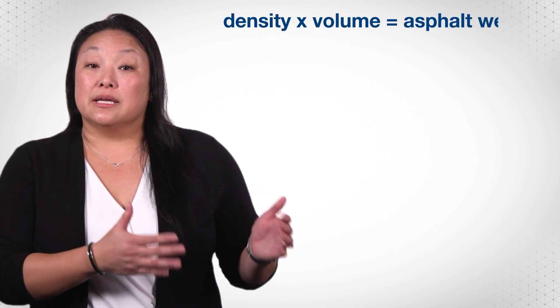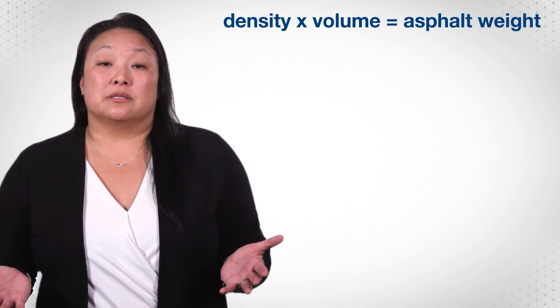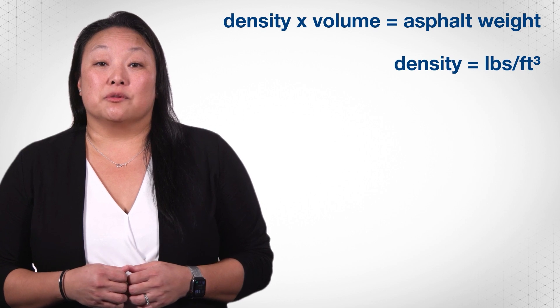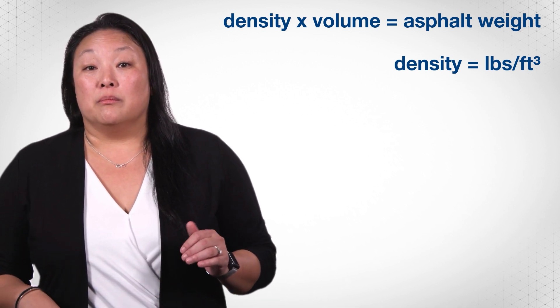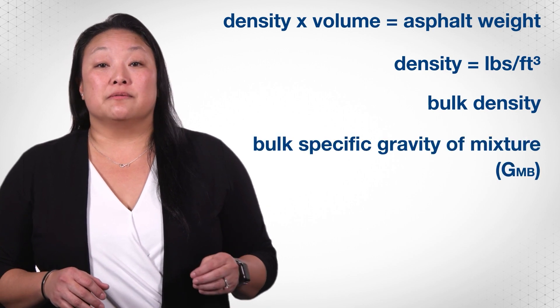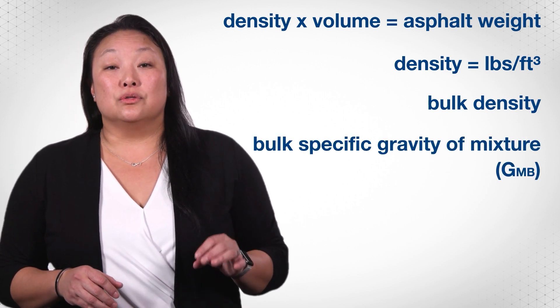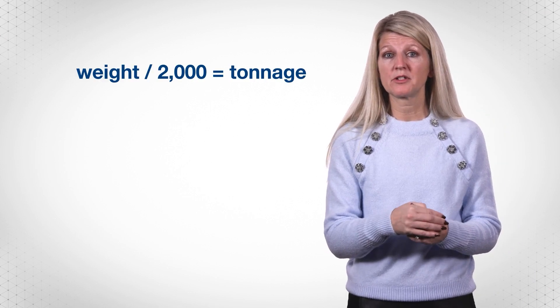Next, use the density provided by the supplier as part of the mix design. Multiply the density by the volume to get the weight of the asphalt mix to be placed. The density is reported in pounds per cubic foot, and may be called bulk density or bulk specific gravity of the mixture — GMB. Divide the weight by 2,000 to get the tonnage for the job.